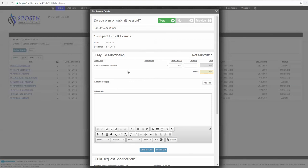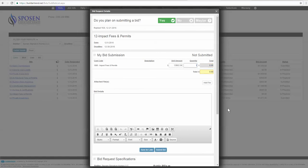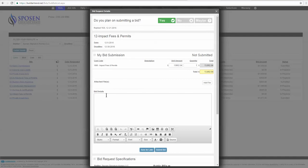Going back up here, we're ready to do our bid. We've reviewed the plans. We looked at the site plan, we looked at the builder specs, and we checked out the selections—obviously it pertains to your particular trade. We've come up with a number. In this case, for me, for permits and impact fees on this job, it's $13,862.04. You're going to have to give it a quantity. You may have multiple line items that you bid on. Some trades have multiple things that they do for us. So when you get invited in to bid on something, it's going to be based on the job, and then there'll be multiple line items. So make sure that the line items for the particular bid request are all filled in.